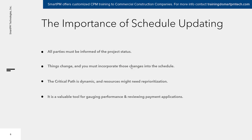Schedule data can also be used to compare with payment applications and to understand performance. If performance is lacking, you need a digital representation of that. Contractors study sub payment apps; owners study contractor payment applications — it's an important part of the process that payments are being made timely, not overstated or understated, because payment issues can cause delays. The schedule update serves as a great tool for making sure payment applications are accurate.